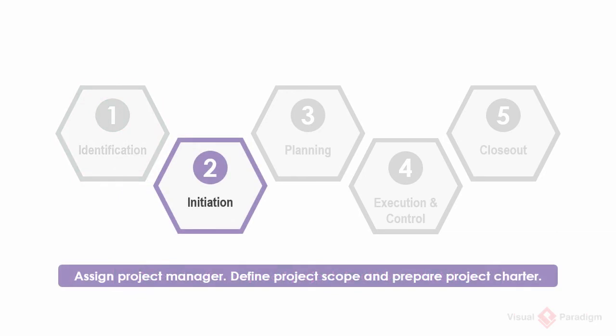The initiation phase begins with the performing organization appointing a project manager to lead the project team and manage the project. The project manager defines the project scope and develops the project charter, which will be approved by the approving authority and project sponsor. The signatures formally empower the project manager to expend resources on the project and begin the planning phase.